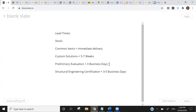The other lead times are for the works themselves. Once you've filled in the form and provided it back to the structural engineering team, they'll come back and do what they call a preliminary evaluation — spending an hour or more doing a basic assessment of the information provided. Usually takes around three business days for one of these to come back. The reason you want this is because it generally doesn't cost you anything, and it gives you an idea about what your maximum spacings are likely to be, or whether the project is feasible, so you can quote the project.